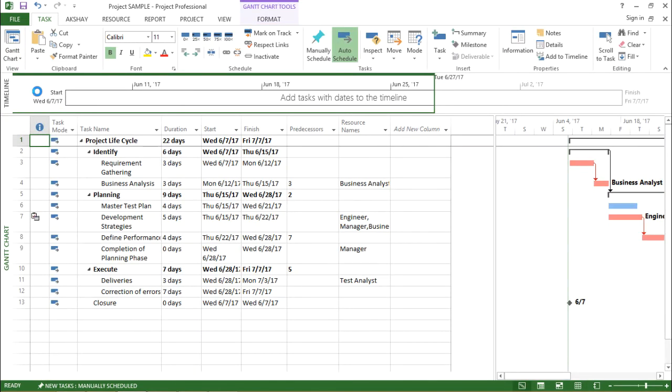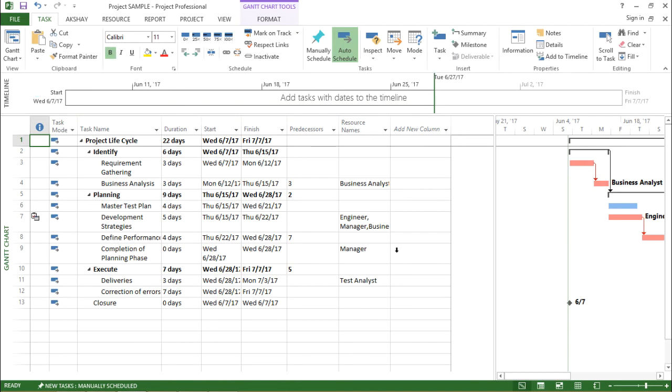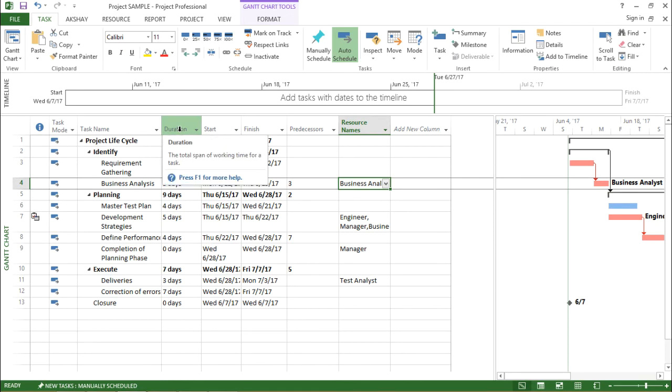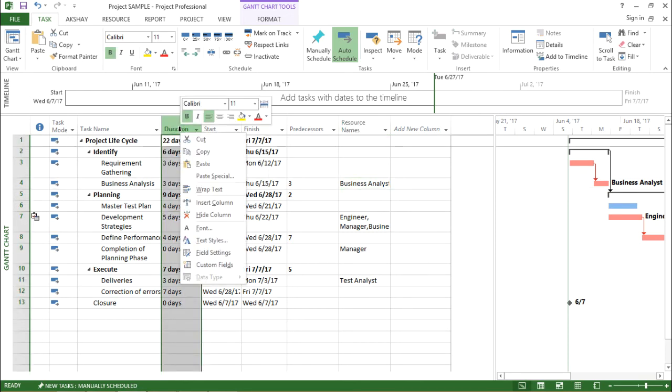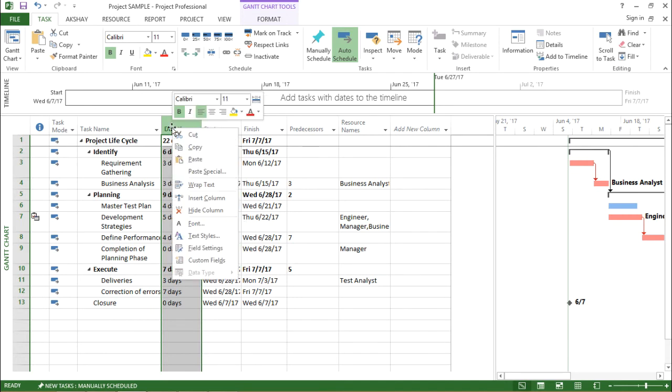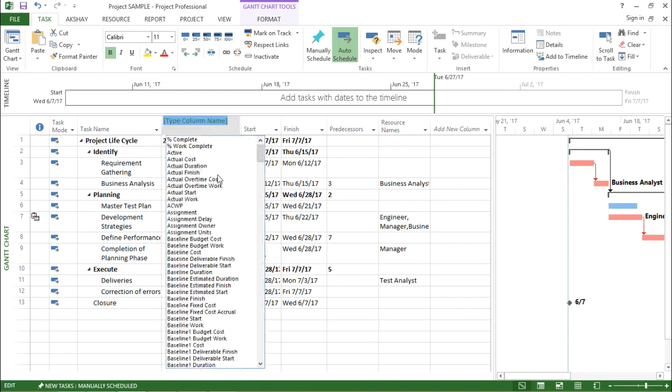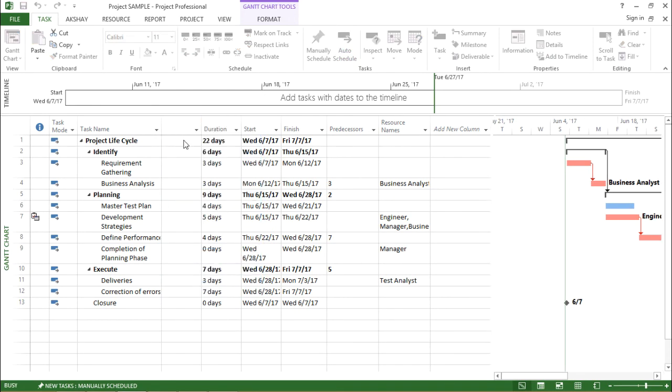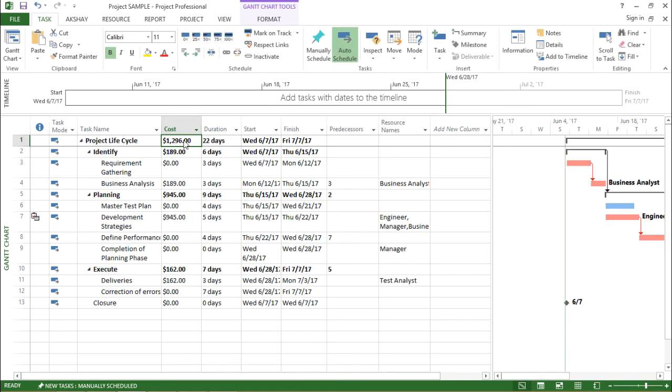We have the resources ready, we have assigned the resources. Now let's move to cost. In order to get the cost of particular resources, I will right-click and introduce a cost column. So I will right-click on the Duration and I say Insert, and I want to calculate the Cost. I have the cost table ready with me. I click here and now I get the cost.